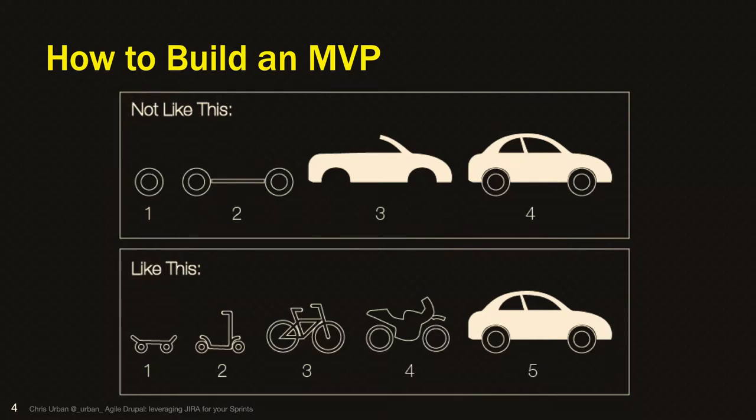There's essentially two different backlogs. There is a product backlog, which is the entire project backlog. When you get to Scrum, now you have a sprint backlog, which is a subset of that product backlog. The Scrum is time boxing it to say, I just want to get this set of items done first, and then my next set, then my next set. And typically, you actually don't even know what is in, let's say, sprint N plus 5, because your priorities may change. And that's the whole benefit of working in Agile.